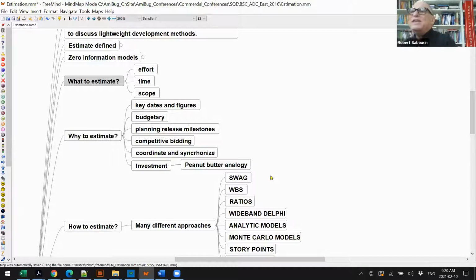But instead of squeezing you to try to say, no, you've got to do it sooner, sooner, sooner, and you saying, no, it's going to take 3 months, 3 months, 3 months, they're saying, sorry, all we've got is 2 months, then, well, here are some alternatives of what we can do in 2 months and what risks we're going to take. So in 2 months, we don't test the performance. If we have a performance problem, we're going to have to recall the release. That's a risk the business might be willing to take to get the thing on the market in time. It's not my decision in testing to make, but it's my job to advocate a path, but to also provide the alternatives and make sure people are making a good business decision based on risk.